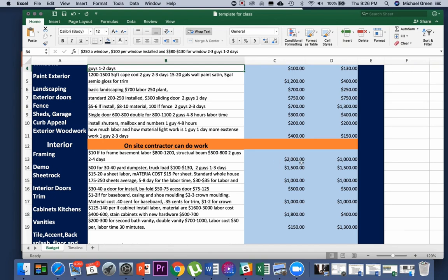And that generally runs about $2,000 to $3,000 if you have to do a little bit of framing. If you walk in a house and it's got the layout that you need and you don't need to change anything, then your framing bill would be zero. Or imagine you go in and, okay, we just need to frame the basement. Maybe it's like $1,500 then. So this gives you some ballpark, but you do want to take note: do we need to frame, or is there a lot of stuff we need to do in the house?